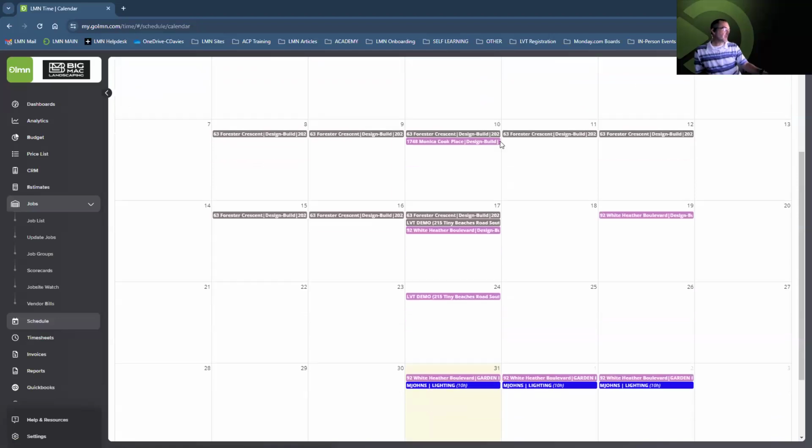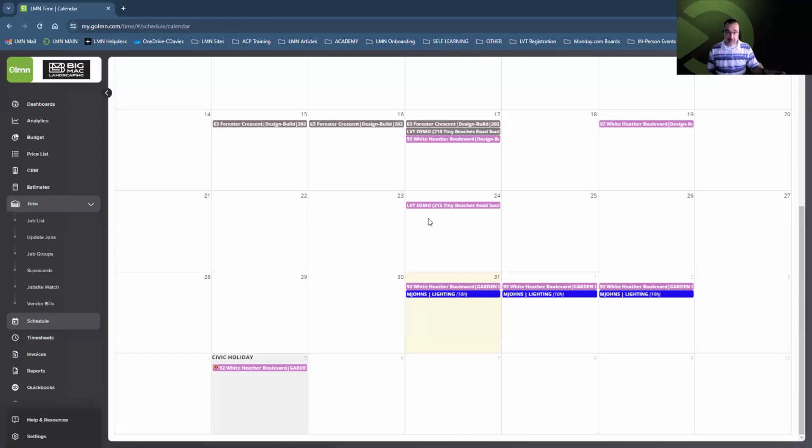Now, if I look at my month and go down to the 31st, Brad, in case you were curious, you're going to be working today, tomorrow, and Friday on that lighting enhancement. Really nice and easy. So for any reason, going back to that schedule buffer that you can add in here, if I know that my crew can get started on the lighting but they're not going to be able to do any of the install until Friday, because my vendor has just let me know that I'm not going to get my lights and all the parts I need for this job, well, then that basically gives me Thursday. I'm going to move this job to Friday.